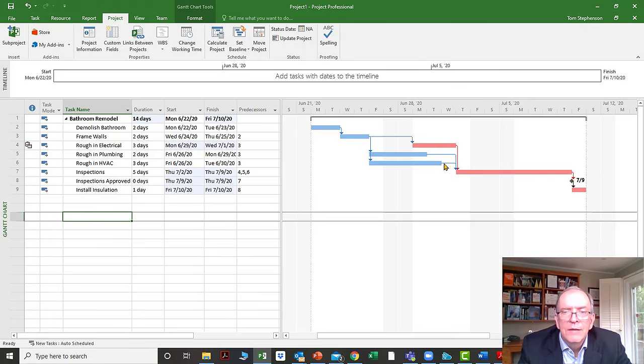Every other activity is following the standard calendar. Some of the problems or issues you may find when you add calendars is that it kind of changes the properties of the critical path, which sometimes can confuse the program a little bit. Like it won't show that these two are critical activities when really they still are, because this is locked in as a start date. It's locked out of the Friday. So sometimes there are some nuances. We'll talk about that a little bit more when we get into the critical path aspect of scheduling. But really the critical path is following through these activities through here and through there.